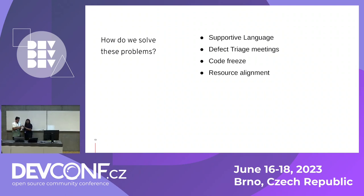Because if we don't have a balanced team, for example, five QEs on one developer, that is not good, right? And vice versa, five developers and one QE, there is a lot of pressure to work on the things. So as a QE manager, I always sit together with the project team and decide what the ratio should be. When we talk about the industry ratio of dev versus QE, it should be either 3:1 or 2:1, depending on the project, the complexity of the project, the timelines, and what we committed to our stakeholders.